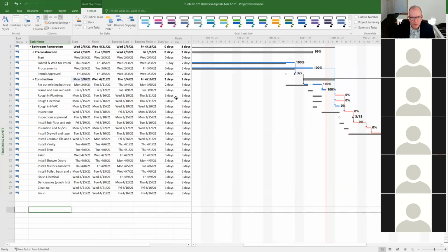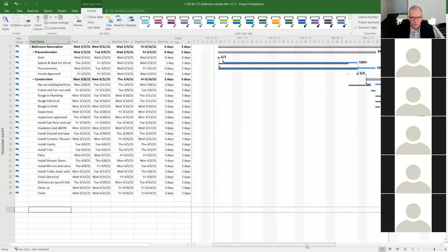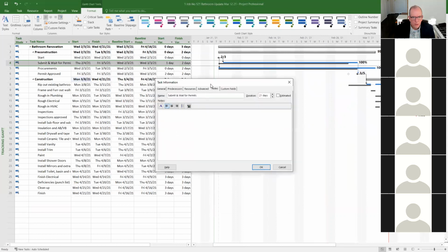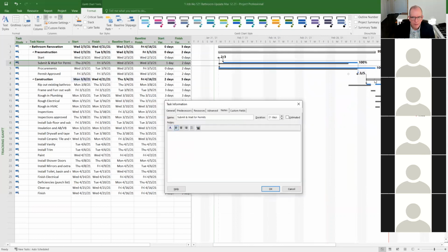We're 3 days behind. And what I would do is I would put a note for each one of these, right? So this is where the discipline comes in. When you update, you want to know what happened. Why did we start 1 day late, right?